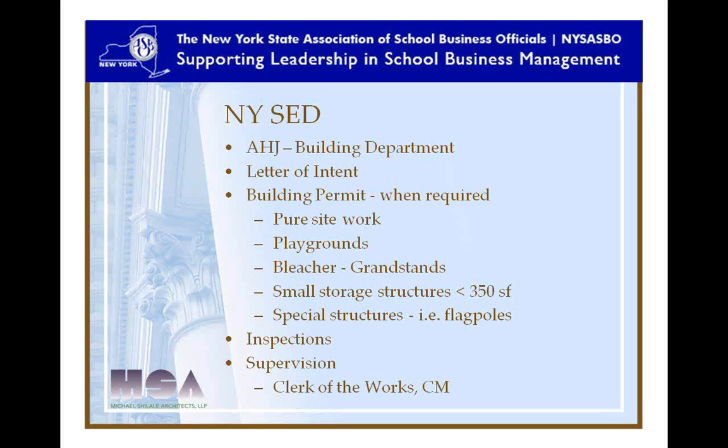But there are inspections that have to get made in every project, and it's important to note that SED does not come down and make those inspections. That's done by your architects or engineers. They are your building inspectors as well as your consultants. And the districts are required to provide supervision of the construction, which is typically not provided by your architect or engineer. And SED has a very good newsletter on this particular issue.